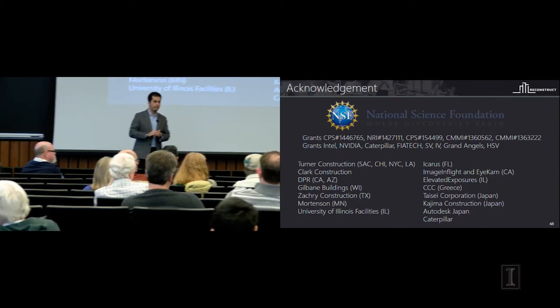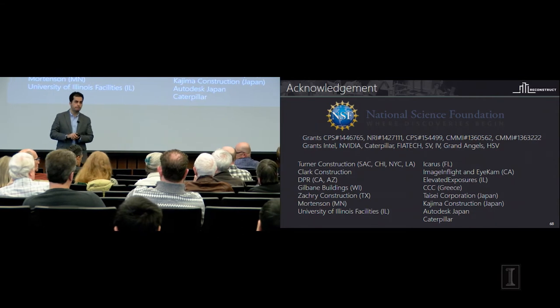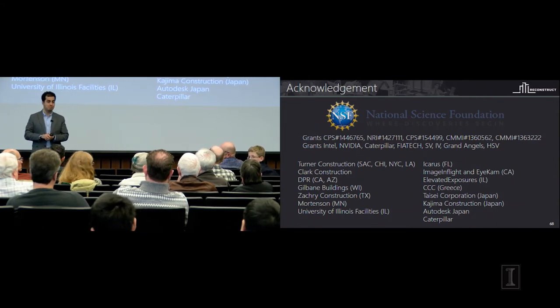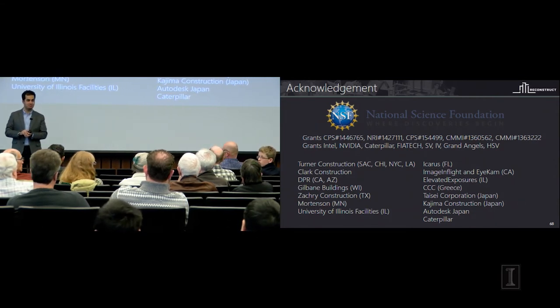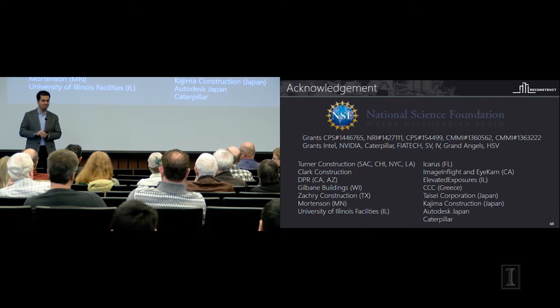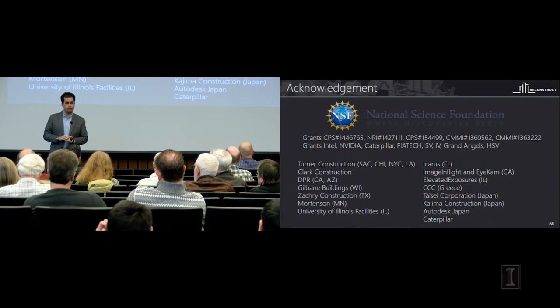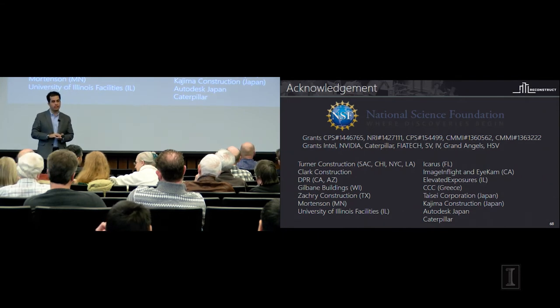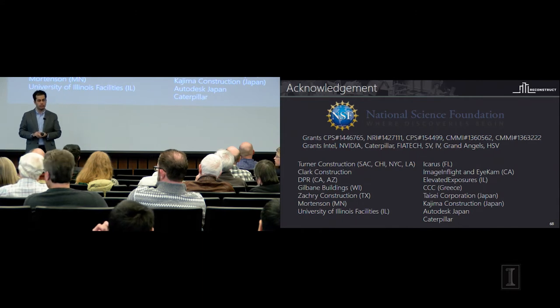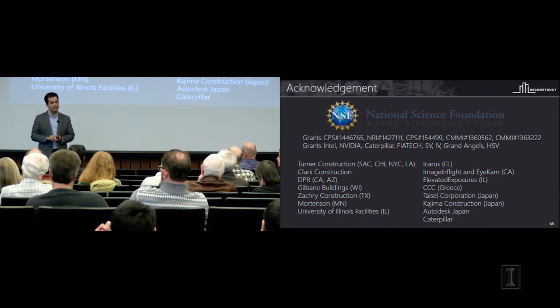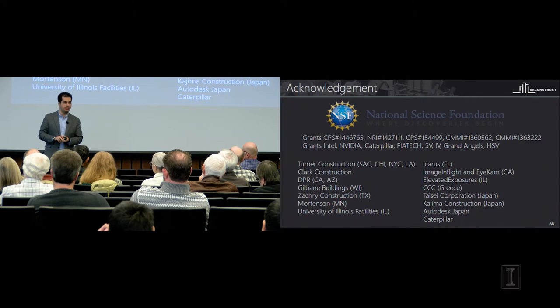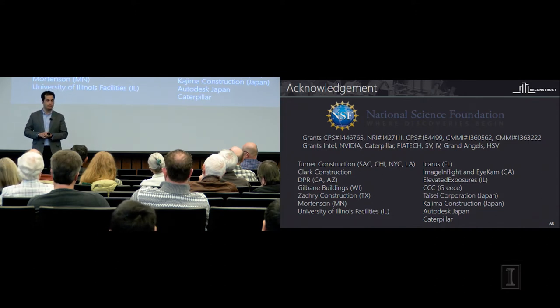Yes? Any estimate of the average cost savings on one of these large projects? And do you have to share the profits with the University of Illinois? That's an excellent question. So on the first part, yes. We've been very fortunate that we worked with Clark Construction and Turner Construction on understanding the return on investment that it would make on these types of projects. In one case, we're very glad that we were able to improve reliability of plan, which is a metric that we use for performance. And we showed that we can improve it by 25%, which was really significant.